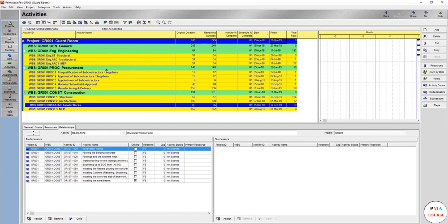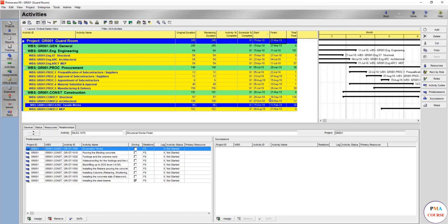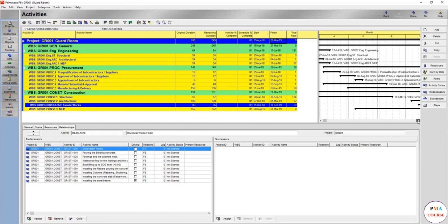What is this useful for? It's useful for showing, for example, that the structural work would take from 28 June to 16 September and so on. And you would know when the architecture would start and when it would finish. And when shall you bring the facade specialist subcontractor, and when all the facade works would be finished to look good in the exterior.